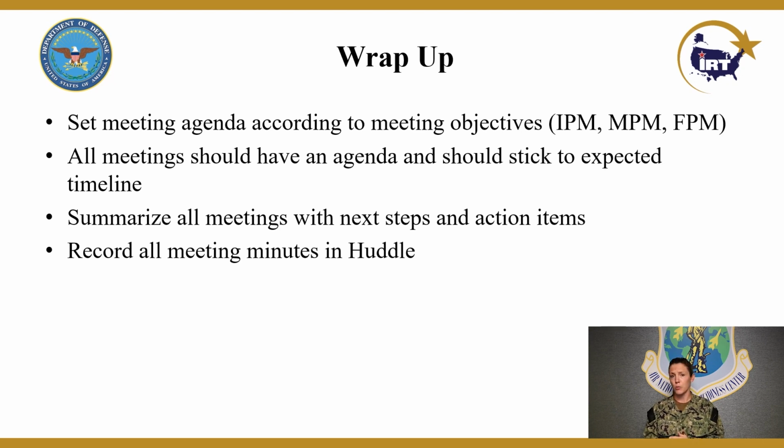That agenda should also be sent to your respective service program manager at least a month before the meeting. So if there's anything that you might have missed, or if there's any advice the program manager can give you, they have ample time to do that. Also, summarize all your meetings with next steps and action items in Huddle, along with your minutes, and you guys will have a great time. That's all I have, and we're going to go into now the joint management workspace, the joint planners workspace.